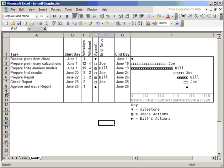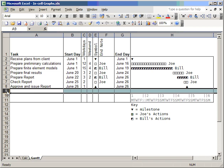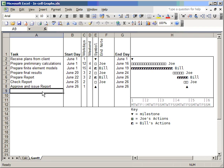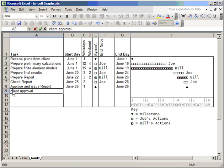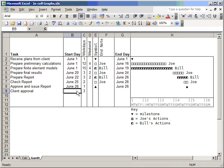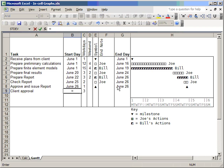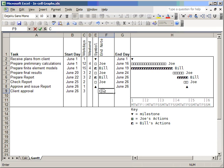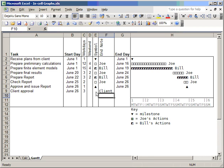Let's also just insert a new activity. So I think it's just a matter of going insert. Maybe there's some kind of client approval process required. OK. Let's pop that there. And maybe I should have started with a capital letter. And let's make that three days long. And let's give it a start date equal to obviously the end date of the issue of the report. And let's put our client in as an endnote.